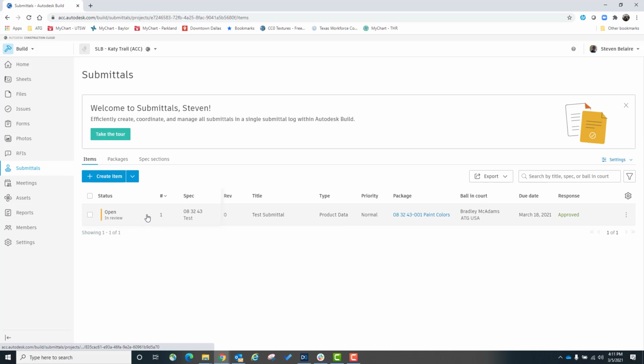You can also build in dates for material tracking. I think there are 4 date columns where you can specify when it's due, when the material is due on site, what the lead time is, and you can backfill it from there.